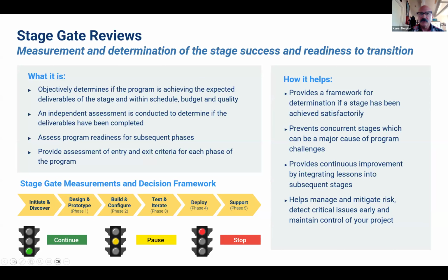And a lot of companies don't do the stage gates, I find, these days, because they feel like the agile world doesn't need something like this, and I disagree. So I think your projects will still have phases, and it's still important to do this type of thing, or you risk that projects are going to have situations where they're operating multiple phases simultaneously. They're doing analysis, design, construction, testing all at the same time. And then it becomes a real issue.